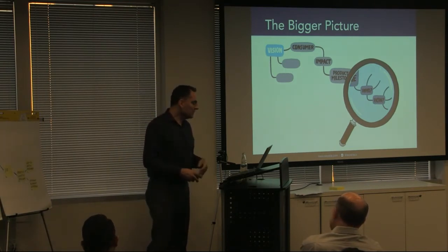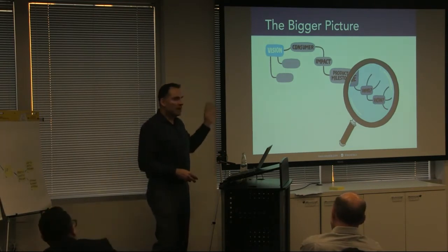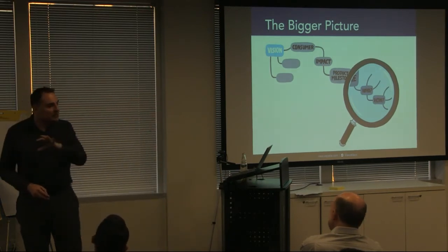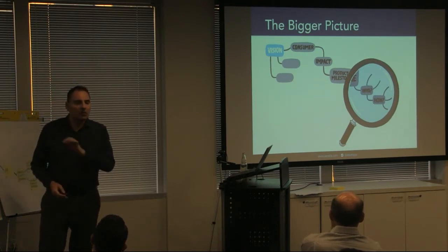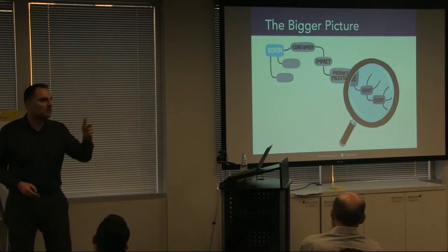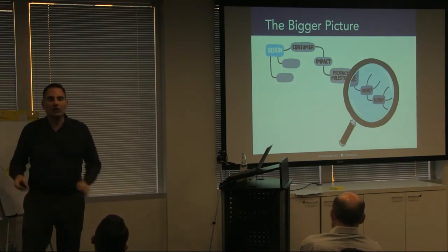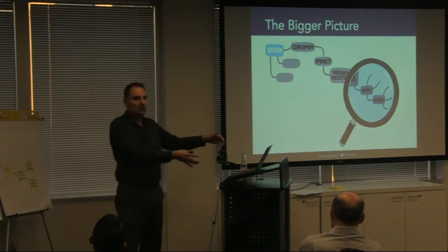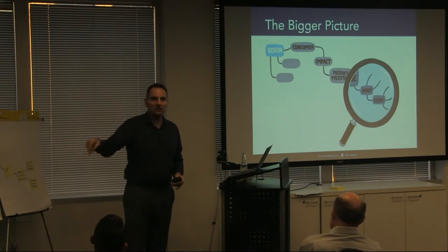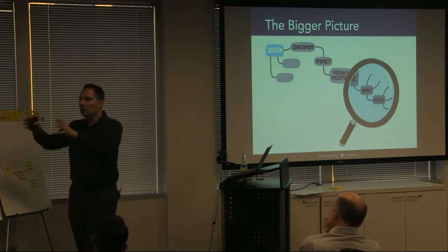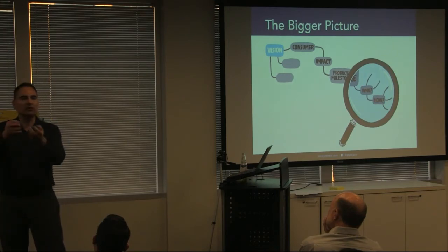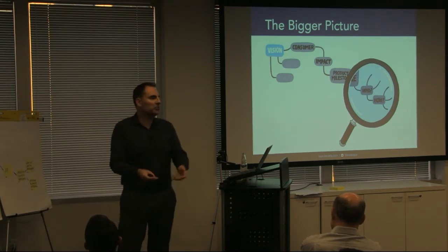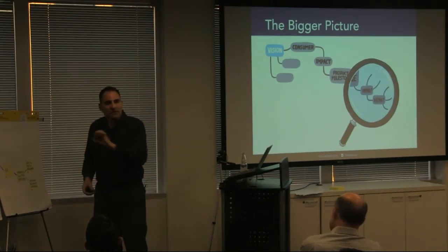We're getting a little into road mapping here, but if you build a road map from these sorts of goals, your road map becomes a series of business goals you're trying to hit — no longer a bunch of predefined feature blocks. Instead of saying 'in Q1 we'll do these features and in Q2 these,' we say 'in Q1 we'll focus on engaging these customers to increase revenue, and in Q2 we'll get these people to buy more X.' It is a series of goals.